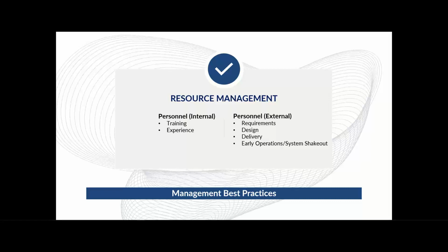Figure out ways to make the implementation smaller. Now, I'm not suggesting that you don't get the features you want, but you don't have to roll out all the features that you want at the same time. When dealing with an outside vendor who is not familiar with how the organization works, you may want to make sure that you have as many safeguards in place as possible. One of my mentors used to always tell me, under promise and over deliver. If you're upgrading a solution that has been in place for many years, find a way to migrate functionality away over a series of releases.